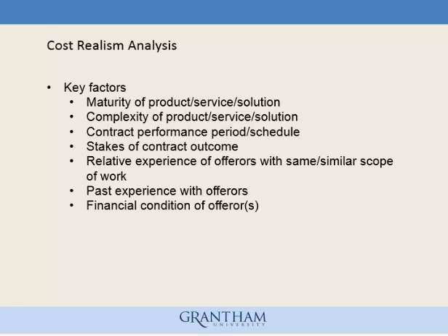Some key factors that affect a cost realism analysis are the maturity of the product, service, or solution, complexity of the product, service, or solution, contract period of performance or schedule, stakes of contract outcome, relative experience of offerors with the same or similar scope of work, past experience with offerors, and financial condition of offerors. Obviously, there are many other factors that can limit the effectiveness of a cost realism analysis. This list is just some of the most common.